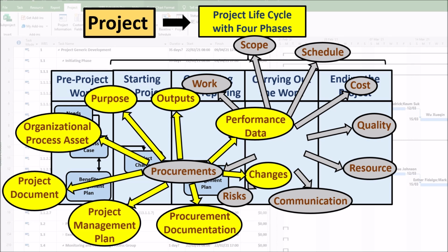All payments must be made in accordance with the terms and conditions of the procurement contract. 2. Supplier performance evaluation documentation. This documentation shows the vendor's ability to perform the work on the current contract, whether the vendor is eligible for consideration on future projects, and how the vendor is performing or has performed on the project. 3. Updates to the pre-qualified vendor list. Pre-qualified vendor lists may be updated based on the results of the procurement control process, as vendors may be disqualified and removed from the lists based on poor performance.